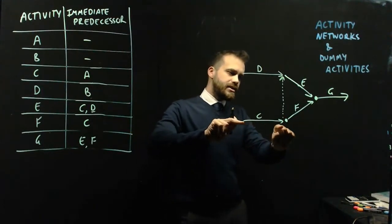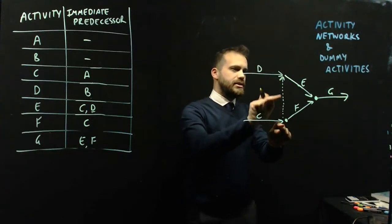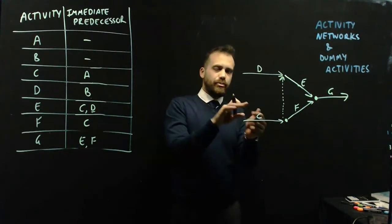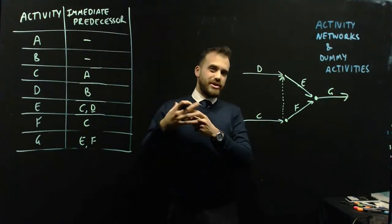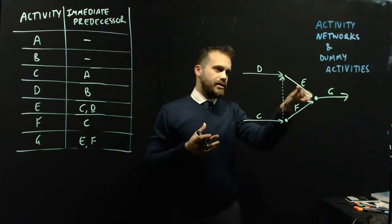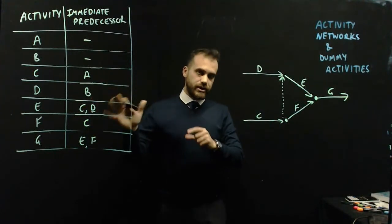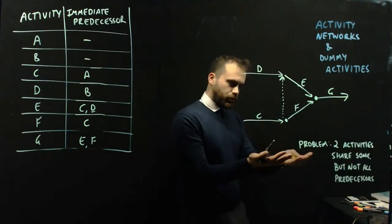So this is the line that's going to join C to E. It's like a pretend activity that takes zero amount of time that happens between C and E. And it allows us to get around this problem.